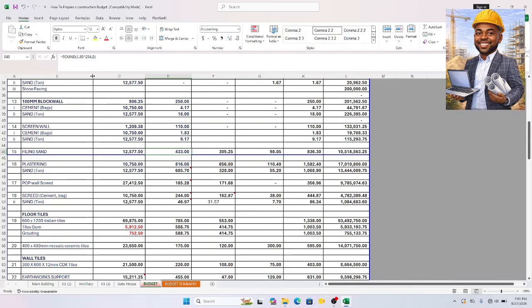You know why? It's because by the time you fill, you don't just fill and leave. You bring roller, you compact. You fill again, you compact. So if the total volume here is 234, and I have to compact, the compaction factor is between 1.8 and 2 for sharp sand. So if you use 1.8, fine. If you use 1.9, fine. That's in between.